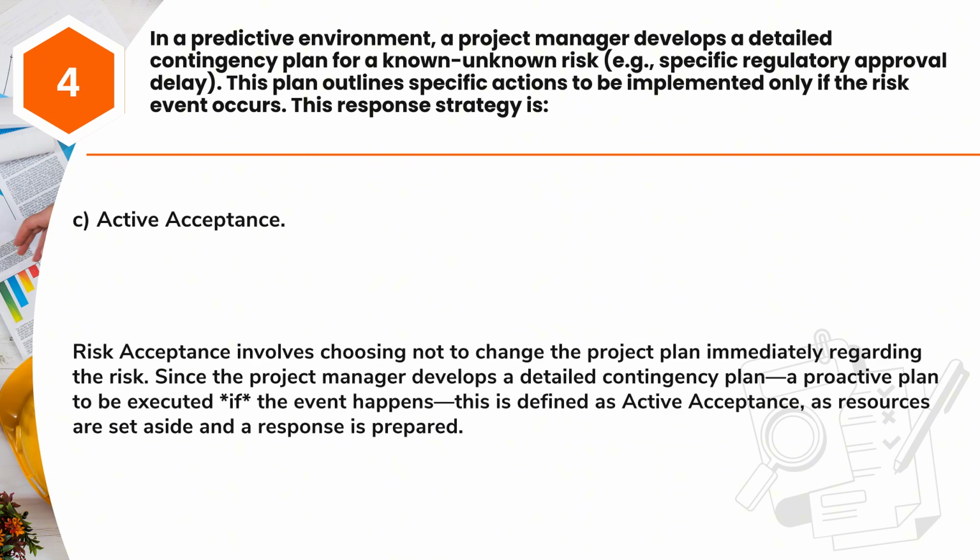Answer C. Active acceptance. Risk acceptance involves choosing not to change the project plan immediately regarding the risk. Since the project manager develops a detailed contingency plan, a proactive plan to be executed if the event happens, this is defined as active acceptance, as resources are set aside and a response is prepared.